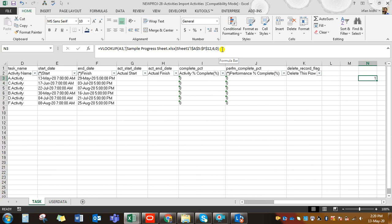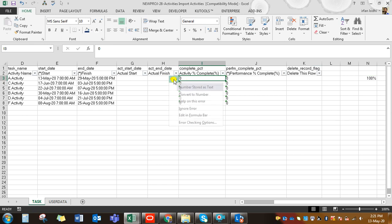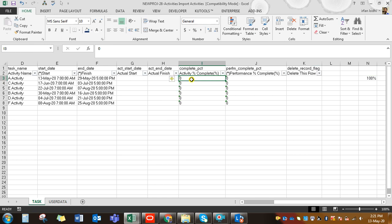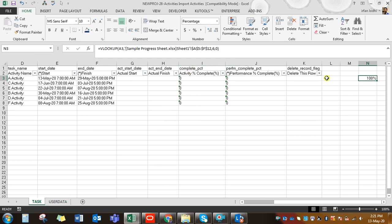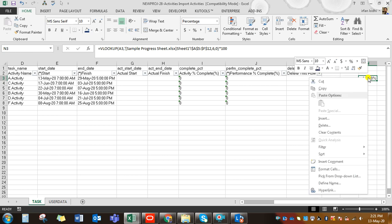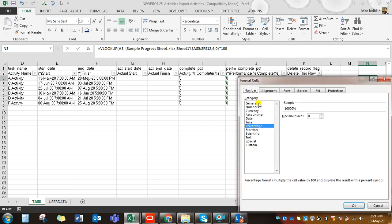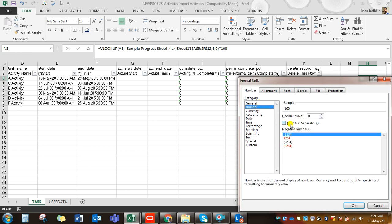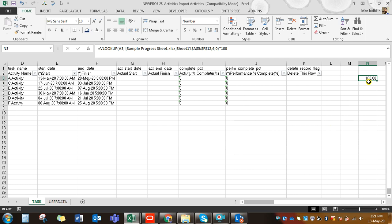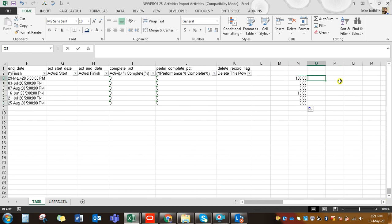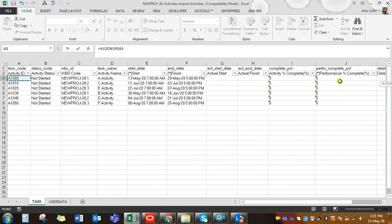If you format the result as a percentage it shows 100%, but looking at the raw values these are text strings, not numbers. What we actually need are numbers, so we multiply the result by 100 to make it a number. Then format the cell as General or Number — without separator, without decimal, or with up to two decimals. It now shows 100, which represents 100%. Drag the formula down to apply it to all rows.